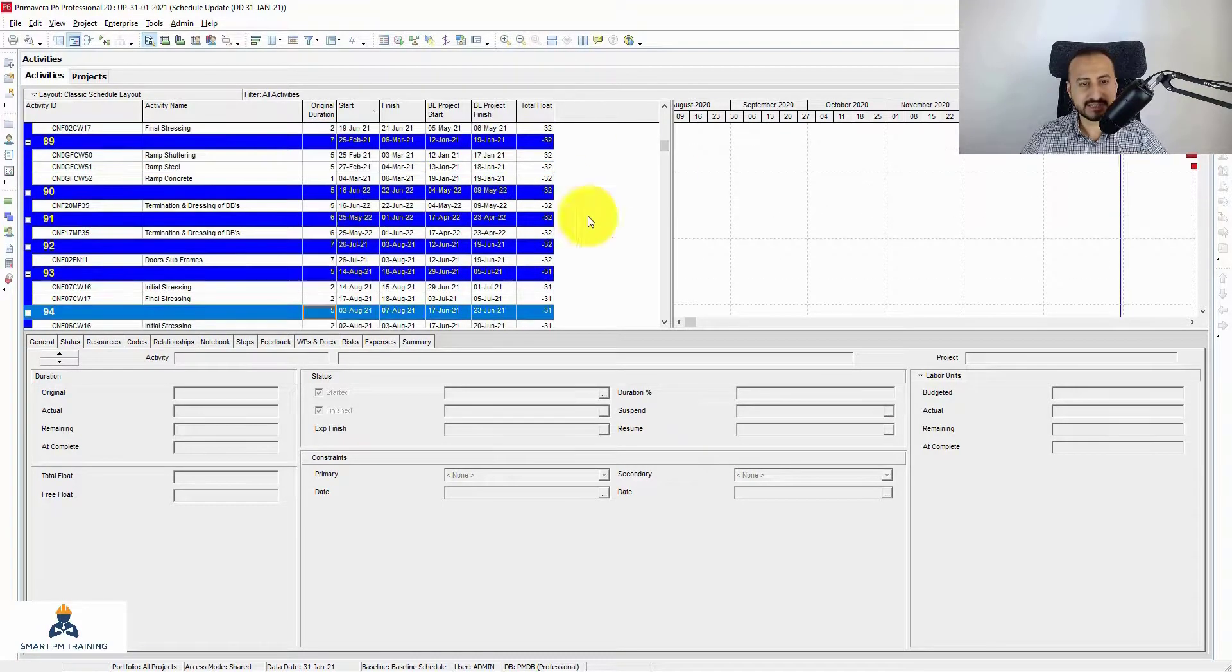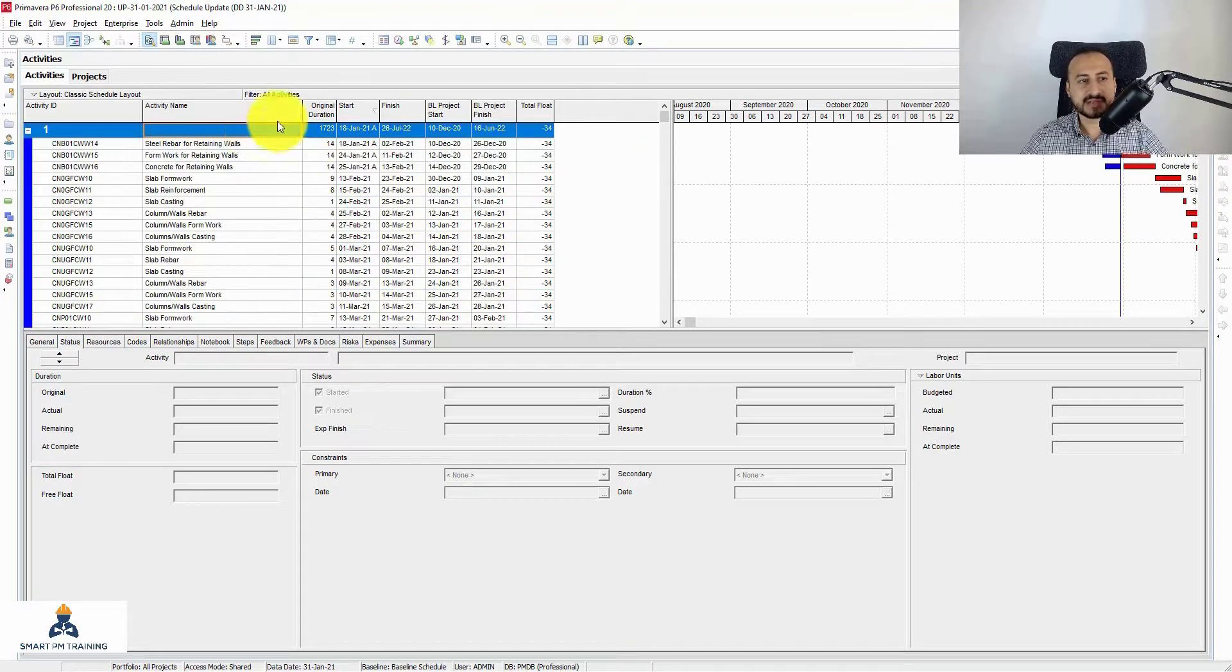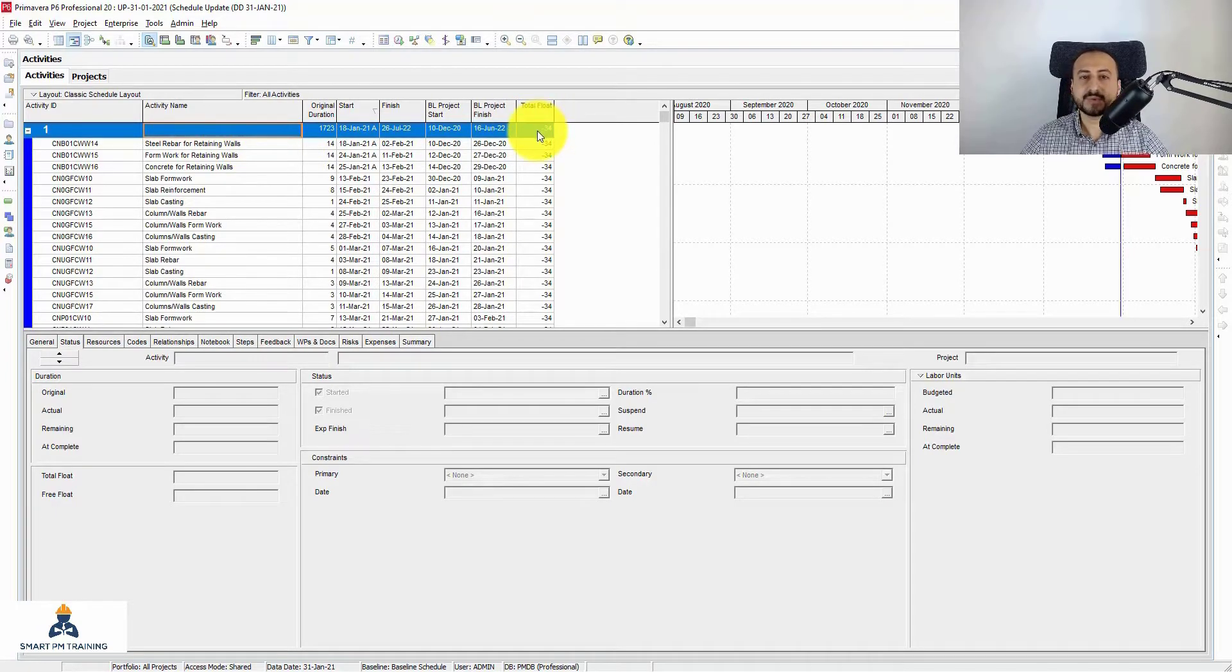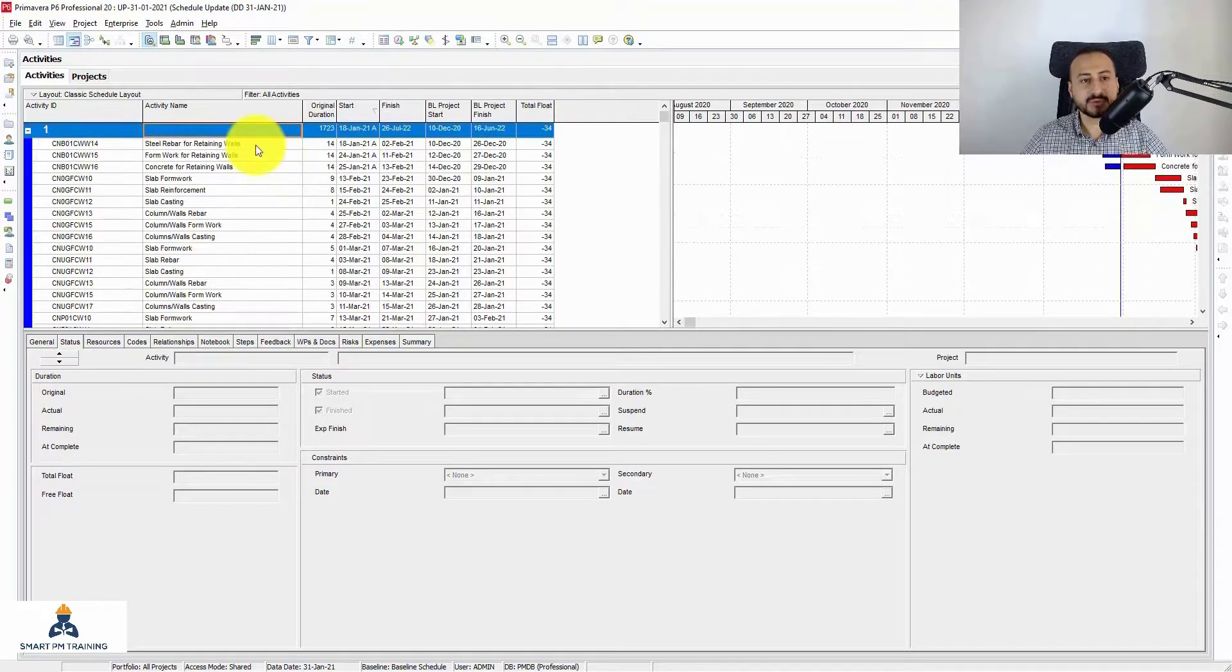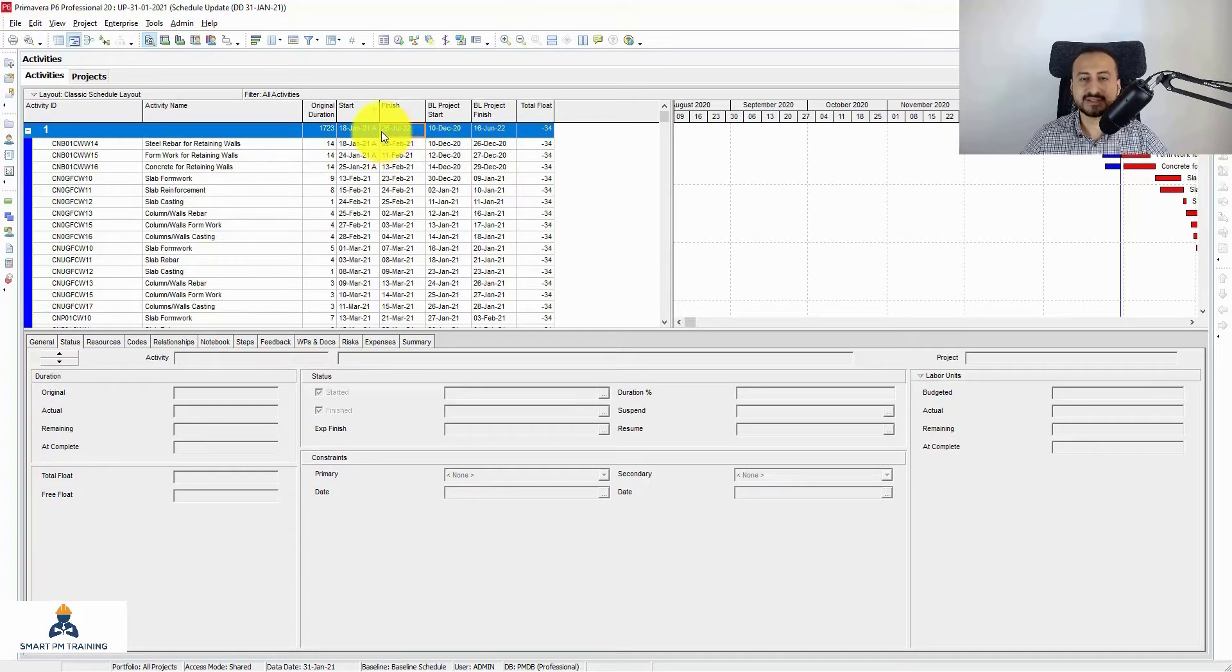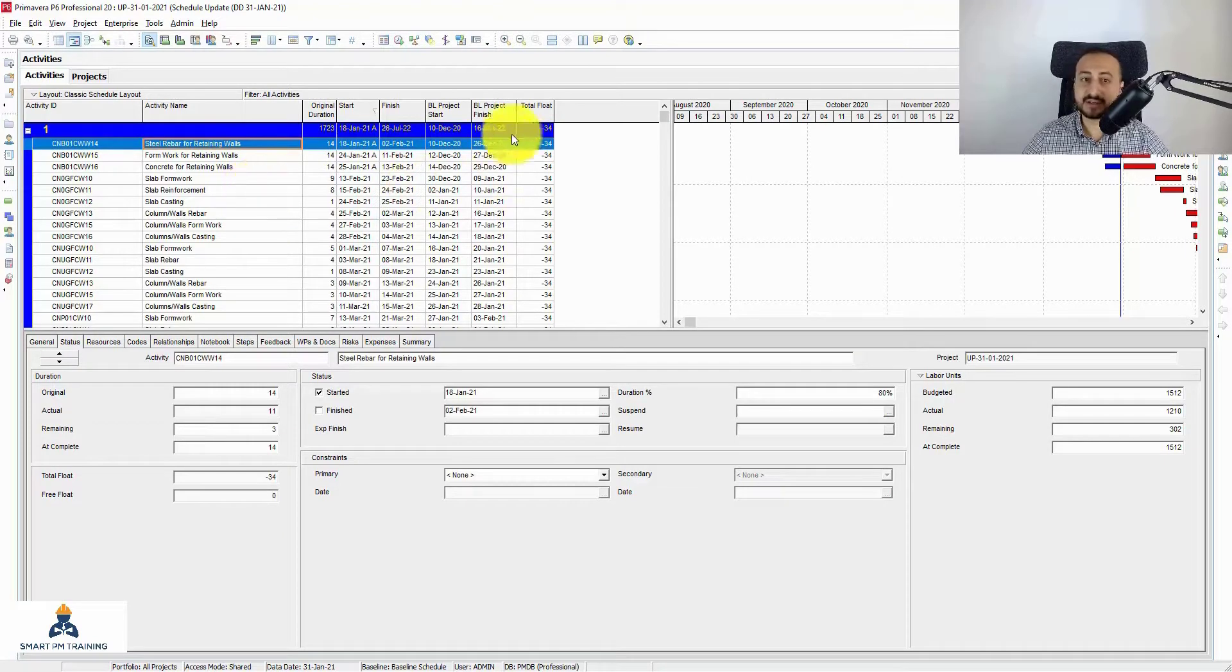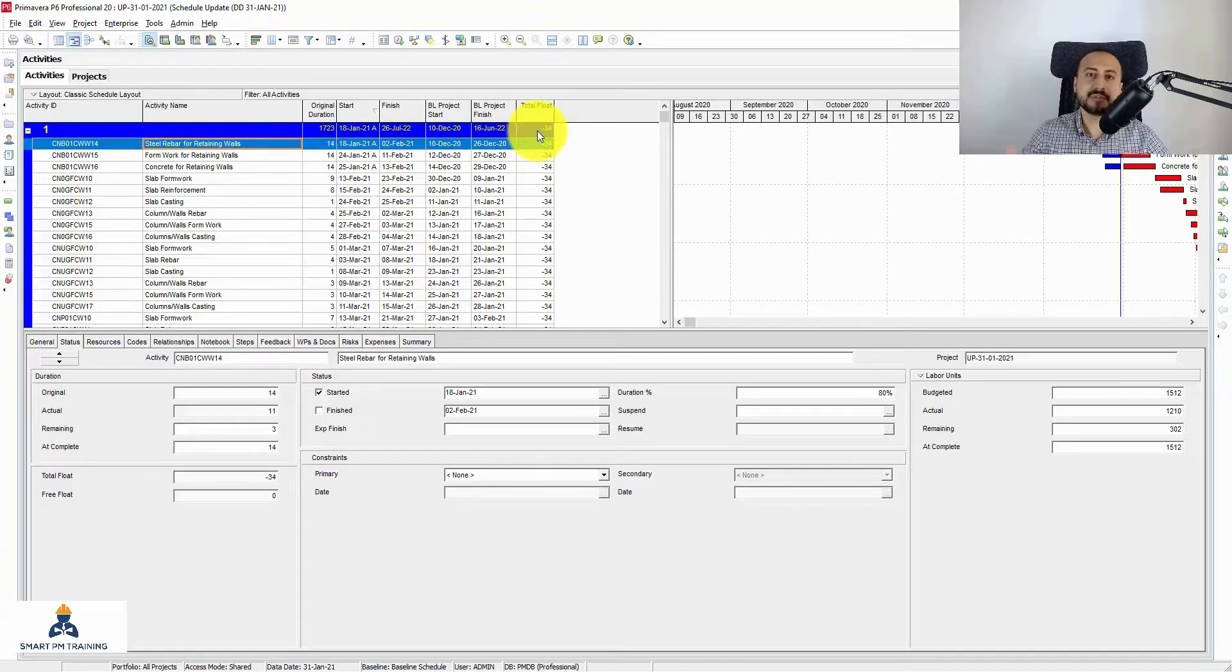We got the point now. This is all critical paths, but the longest path is number one because this path has the same total float negative total float as the whole schedule update. And also the forecasted completion date of this path is the forecasted completion date for the whole program update. So this longest path, it is a critical path which has negative float, but it is long enough or critical enough to drive the project completion.